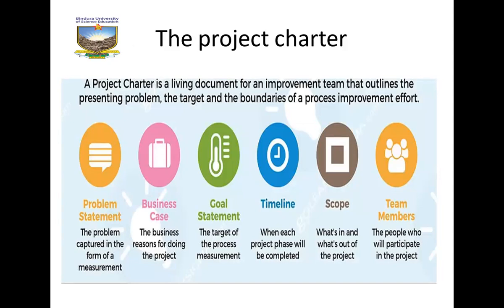Okay, so first of all, you have a problem statement. From our facilities planning section, you can clearly see that the problem statement belongs in the preliminary plan. This is the part where you identify the need for a facility. So similarly, when you are compiling this project charter, you will first of all identify the problem or the need for that project, whether it is an event or a facility being built. That becomes a problem statement.